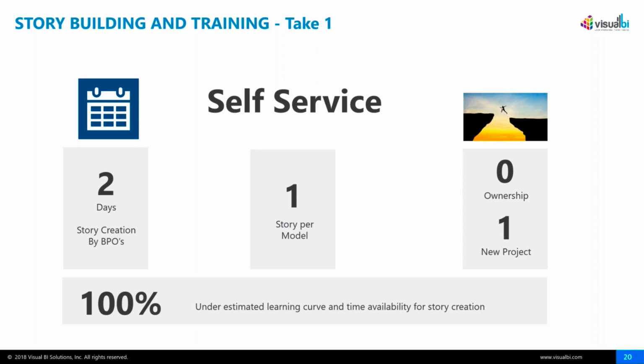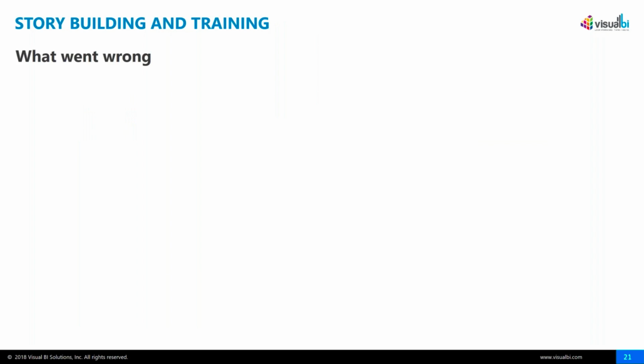And that's a mistake on our side. I'll own that 100%. We 100% underestimated the learning curve and the time availability for story creation from our business users. Things that we may find easy because we live in that space every day just take time. It's not that SAP Analytics Cloud is a difficult tool, but like anything in life, the more time you spend with it, the better you get at it. And if you've got a distracted user community with other higher priorities, then that's what happened.